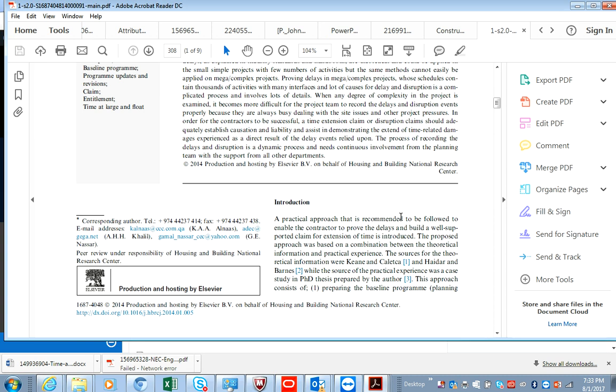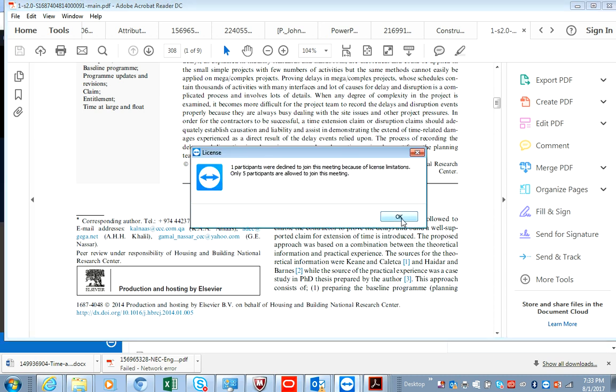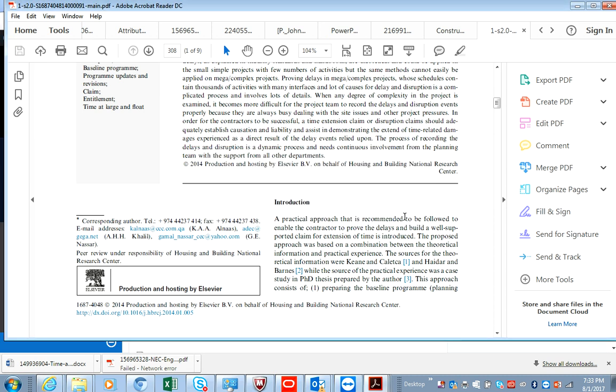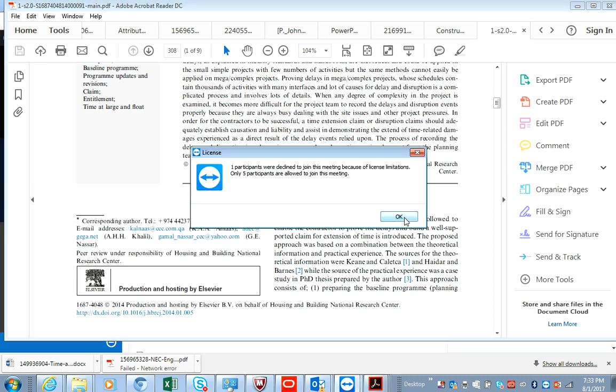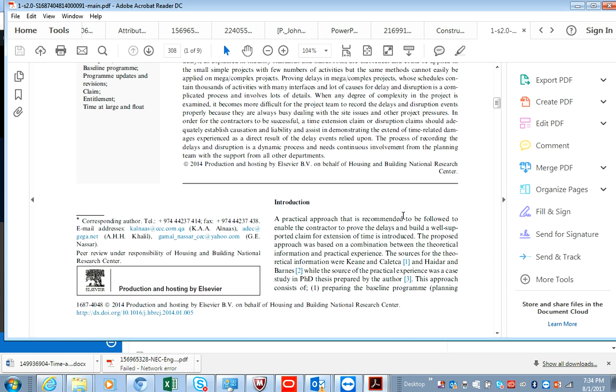a time frame. So when you have these meetings, you have to sit and discuss within all of the teams that are relevant. You have to assign responsibility of these issues to a particular party, not necessarily accountability, responsibility. So understand the difference between accountability and responsibility in the context of contract administration, as well as the risk meetings or risk mitigation meetings. Okay, so in terms of accountability, that means the buck stops with that person. Responsibility just means performance of a task or an activity.